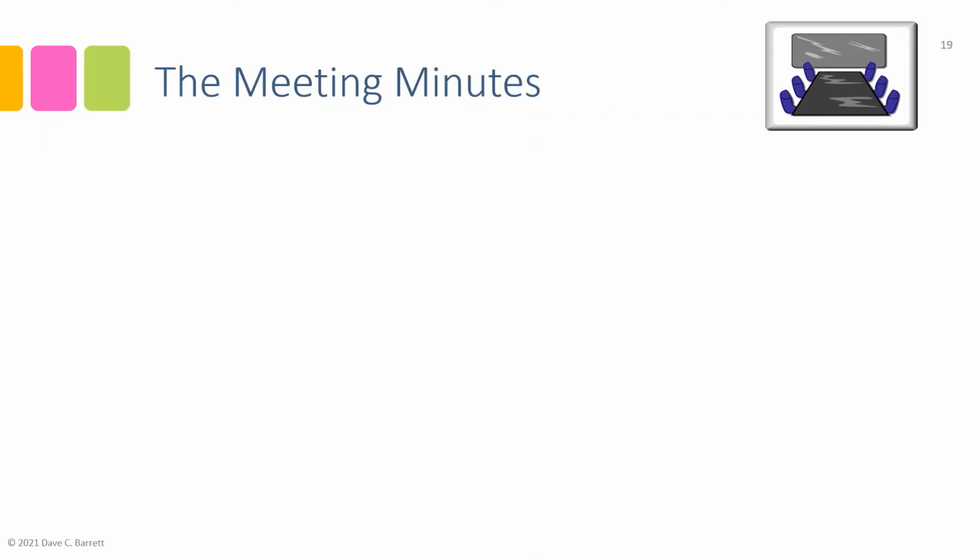Now, again, you always leave a little bit of time when you create an agenda. Leave a little bit of time for those sort of spontaneous discussions. You don't want to make the timeline too tight within a meeting, but the facilitator's job is to keep the meeting on track according to the agenda. You also saw during the meeting that there were times when the conversation, the discussion, the decisions were summarized so that the minute taker, in this case Fatijit, could record it effectively. So that's a good activity. That's a good thing for the facilitator to do.